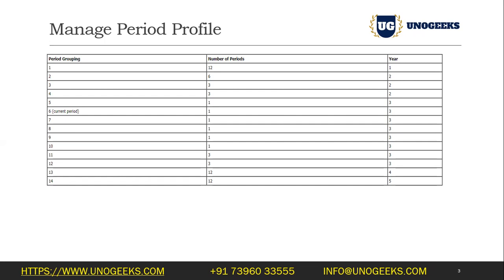Okay. So that event method normally we use. Recently we have used the same event method in Fusion also. We had a third party system in which all the billing related calculations were happening, and they were giving us a final amount that for this particular event, this is the final amount. So we just have to create the event with that amount.